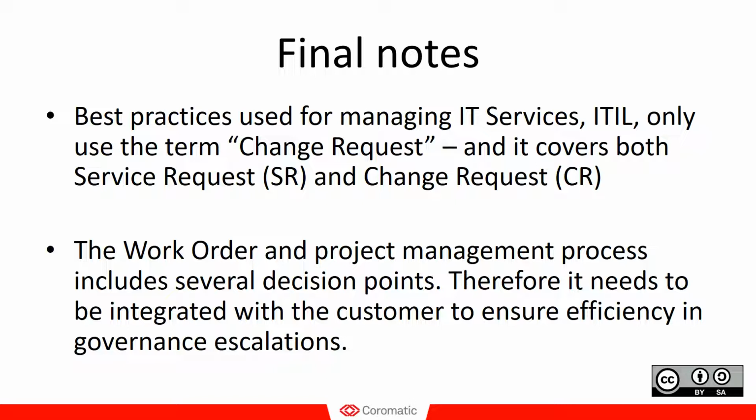And ITIL doesn't use the terms service request and change request. It only uses the terminology change request, and that covers both types. So this is an important thing to take notice of, that if the site management team or the site operations team work on a data center and the site owner or the customer representative is the IT organization, it's important to make sure that there is no miscommunication when it comes to change requests and service requests.